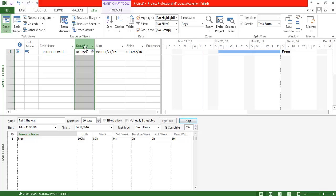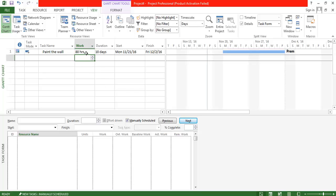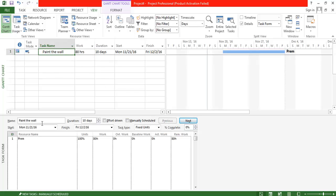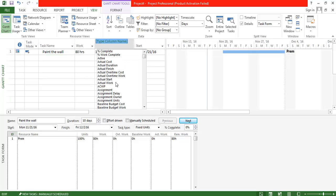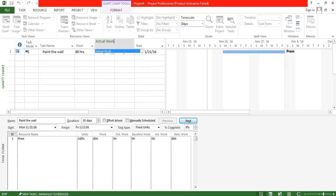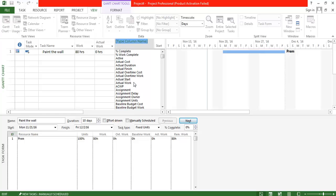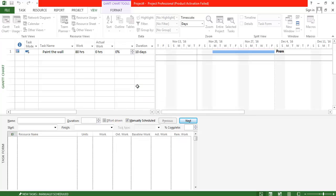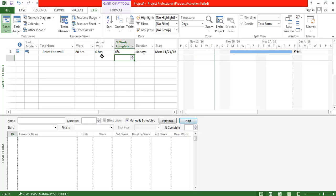When I highlight the task, you can see that 80 hours of work over ten days is available for this particular task. You can view that detail by inserting the work column. Now you can see the work assigned — 80 hours for the candidate. Actual work means the completed work. You can insert another column for percentage of work complete.